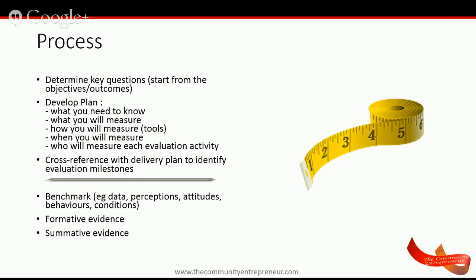So then you think, well, how are we going to look at their engagement in the project? And you might say, okay, the tools, and we might say we want to do a survey. We might also want to do some focus groups with them. You could also have some one-on-one interviews with perhaps the youth leaders, not necessarily the young people themselves, but some leaders that might have been involved in the project. So there's 3 different tools we might have used just for that one thing you'll measure: surveys, focus groups, and interviews with different stakeholders.